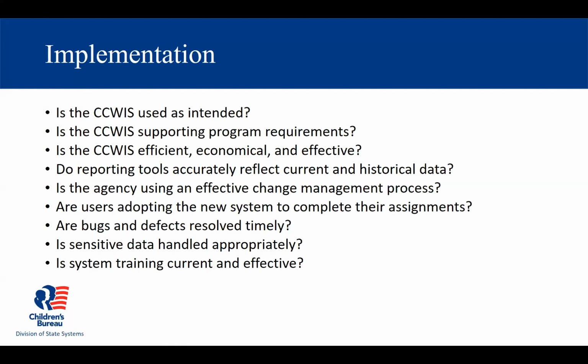To help manage change, it's important to have a process to gather feedback from users during the rollout and make adjustments as necessary. There could be all sorts of unexpected things that could happen during rollout. And you want to have a way to find out about this quickly and be flexible and respond to them. Your change management can also include building support for the system with a process to inform users of changes they've requested or bugs they've reported. It's very helpful if users know they're being heard, that when they report a bug or they make a suggestion for a change, they get some feedback as to what's happening with that, so they feel that their input is valued.